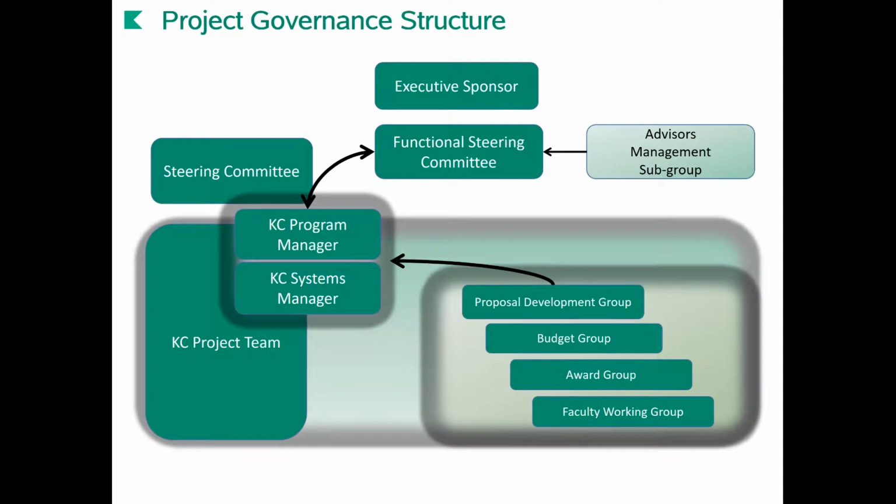So regardless of what structure you come up with, you certainly need to think about what makes sense at your own campus to make sure that you have decision making in place when issues arise that need decisions, and you want to make sure also that these are people that can react quickly. You can't wait 3 months for a decision in these kinds of projects. That'll just throw your budget, your timelines, and everything way out of whack.